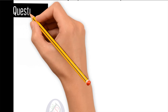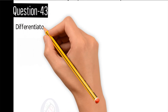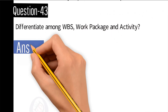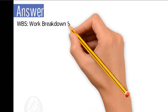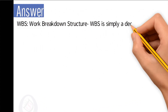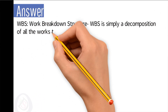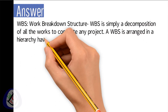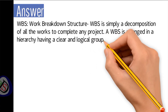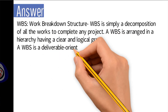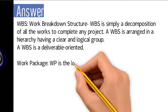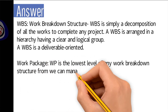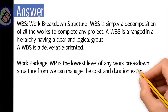Question number 43: Differentiate among WBS, work package, and activity. WBS stands for Work Breakdown Structure — it is simply a decomposition of all the work to complete any project. A WBS is arranged in a hierarchy with a clear and logical grouping, and is deliverable-oriented. A work package is the lowest level of any WBS, and from it you can manage cost and duration estimation.